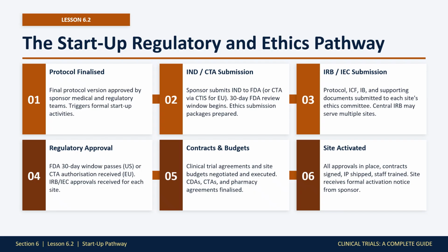Step 5. Clinical trial agreements and site budgets are negotiated and executed. This step is chronically underestimated. Contract negotiations between sponsors and academic medical centers can take months. It is the leading cause of startup delay in industry trials.